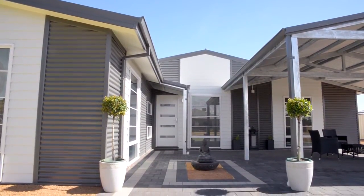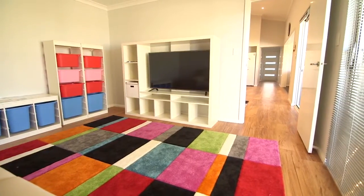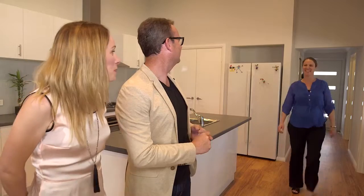Well, we're on schedule. It took 10 weeks to build the home in the yard in our facility. And it took 7 weeks on site, so 17 weeks in total, totally on time, no delays at all, and it's now completed. So Belinda's really excited and really wrapped. The home looks terrific, and now her and her 4 kids can settle down to living a happy life moving forward.